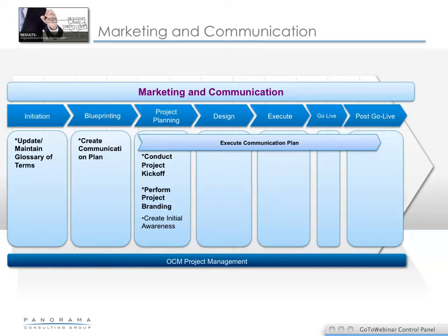And that communication plan has many different parts to it. It basically has your audiences, your vehicle, meaning what channel you're going to use to communicate. It has how often you're going to communicate, and who's responsible for designing the communication. It has status on there as to exactly when something was produced, and then also you try to analyze exactly how effective that piece of communication was.